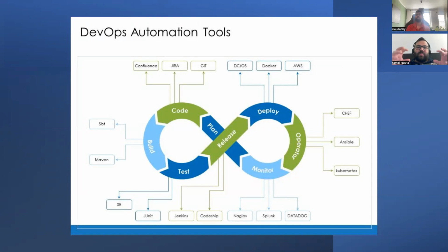If there are three different teams, and each one has 10 requests, the DevOps team will have 30 requests. In that case, the product owner has to prioritize which tickets need to be completed in the 2 weeks of a sprint. That is why we are using Jira or different tools in a planning phase.